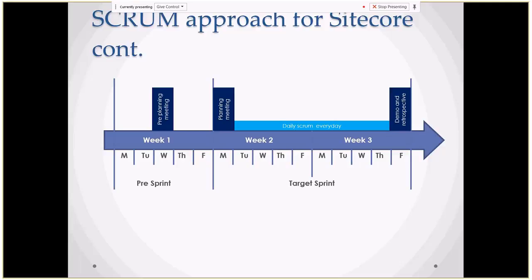People get them 3 days early. Otherwise, they can't provide a good estimation. And if there's, sorry, can I add? If there's anything unclear when it comes to the planning meeting, if there's any requirement that is not given as final, the build team has the authority to not accept the requirement and to go ahead with the rest of the stories.